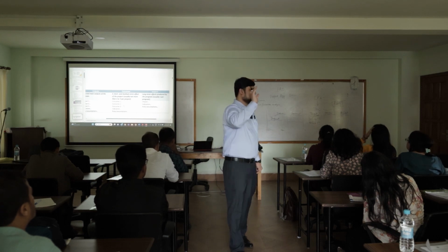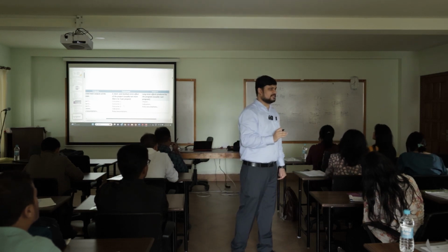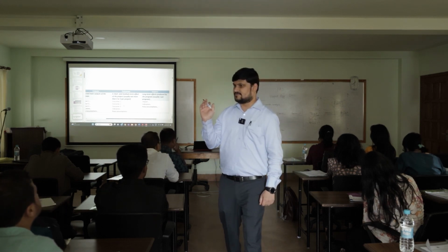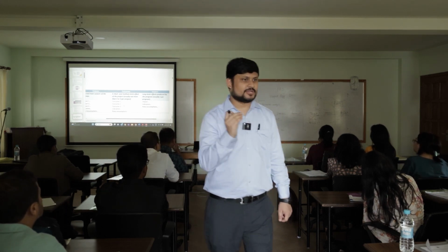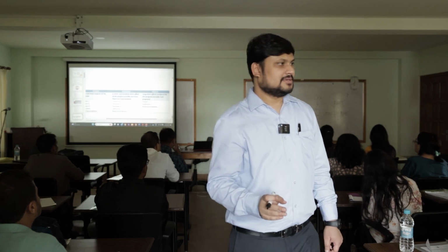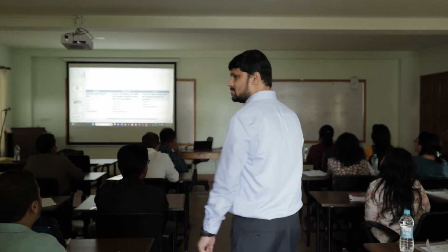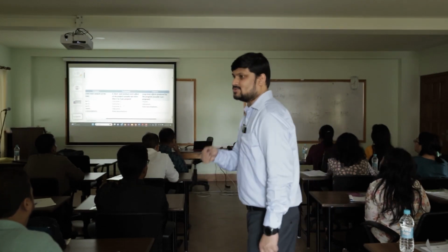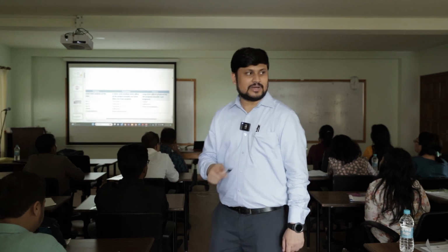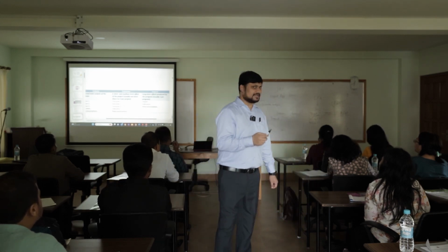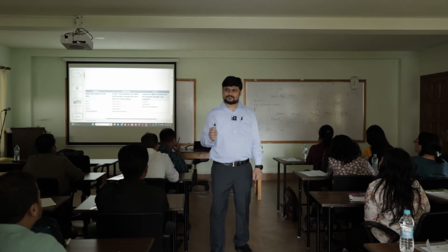Right from the beginning, how it is conceptualized, why it was conceptualized. It will have a very detailed literature review of why this program is required in the first place. It will also have a literature review of what other programs were there in the same space to address the problem, what the gaps in those programs were, and how my current program is mitigating those gaps and coming up with newer solutions.